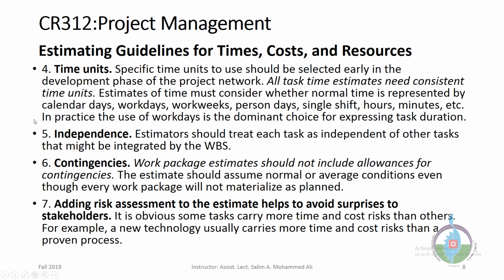The fifth guideline is independence. Estimators should treat each task as independent of other tasks that may be integrated by the WBS. So each work package's estimates are independent of the others. You should not rely upon other work packages to be finished to estimate the new one.